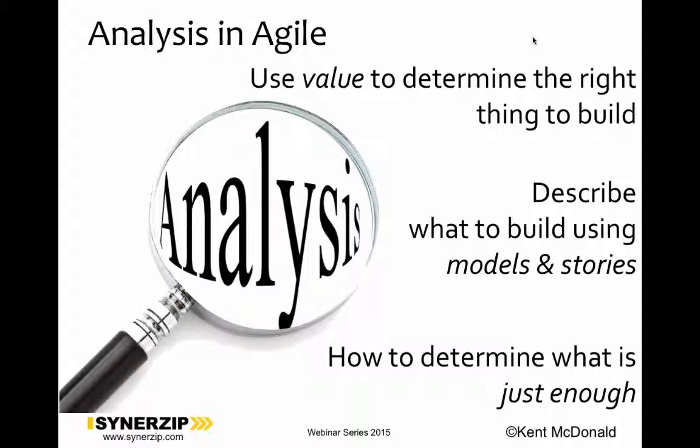And it's only after that that we then go back and identify, finally, what are some things that we as a team can do to help them drive those types of behavior changes. So these are the things over to the left. The items furthest to the left are what are known as deliverables, or the outputs effectively. So for example, in order to have our players invite their friends, we might be able to provide them some animated invite capability.